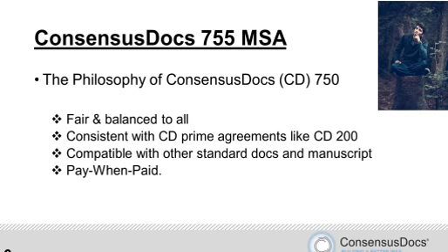This is one of the few issues where at least one organization involved in consensus docs has on their website alternative language, not saying that it's a better best practice, but it's pretty easy language to implement pay if paid if that's what their determination is. But that is not what's published in the coalition effort. And that's the one question I always get, right? Like, hey, is this pay when paid or pay if paid? And you have to look at your state law on that issue. And that topic's probably a whole other webinar, and it's a hot button issue. But I did want to address that.